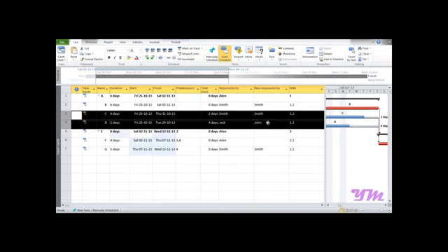So the further sequence goes in this manner: 1.1, 1.2 and 1.3. Now suppose I want to make C and D part of B, then I would again indent them, so the sequence changes to 1.1, 1.1.1 and 1.1.2. And in any case if I want to bring it back, you can just click over here, outdent, and it comes back.